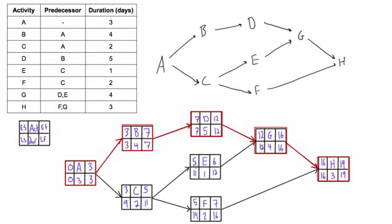If you look at C, E, or F, we can actually delay some of these for quite a long time. For example, delaying activity E by one day wouldn't affect anything — according to its late start and late finish, it's allowed to start at the latest on day eleven and finish on day twelve before it would start affecting the end date. This brings up the concept of float or slack — total float, total slack, free float, and free slack — which we will be talking about in the coming videos.